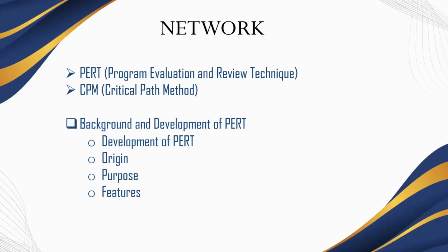Features. PERT is probabilistic and deals with the uncertainty of activity times by using a three-time estimate: optimistic, most likely, and pessimistic. The approach allows the project manager to anticipate potential delays and plan accordingly.